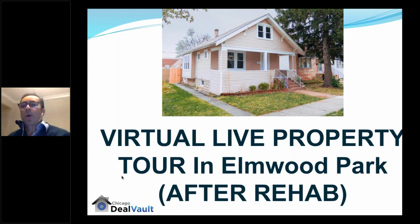It was actually 46,000. So let me give you the rule of thumb. If you do a medium rehab, meaning that you need to do the bathroom, the kitchen, the flooring, the paint, the light fixtures on a 1,700 square feet house that has a basement, multiply that times 2. So that's going to be 35,000. Put a cushion of about 5,000 for unexpected. So that's going to bring you up to close to 40,000.